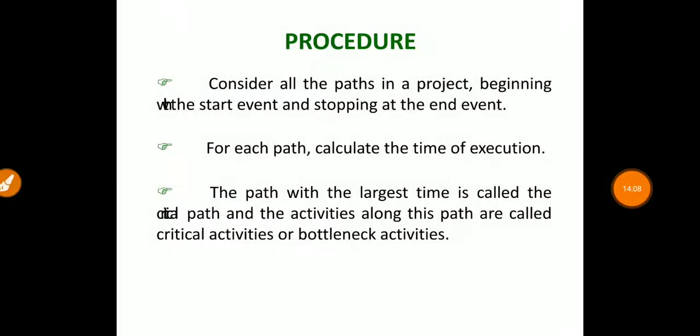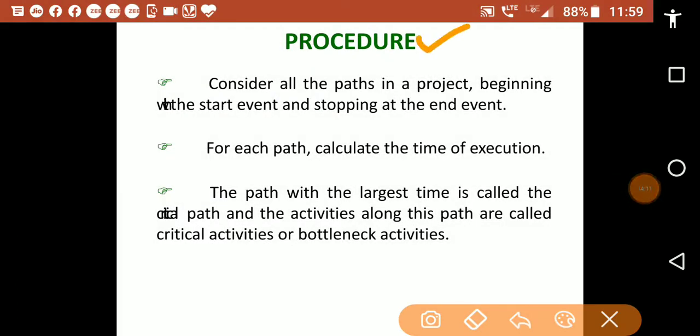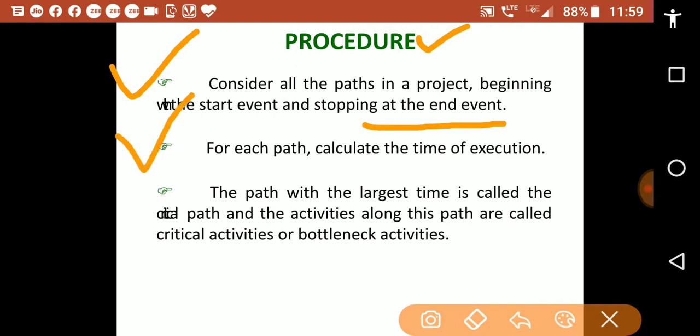So let us see the procedure of CPM. First is, consider all the paths in the project beginning at the start event and stopping at the end event. Second is, for each path calculate the time of execution.